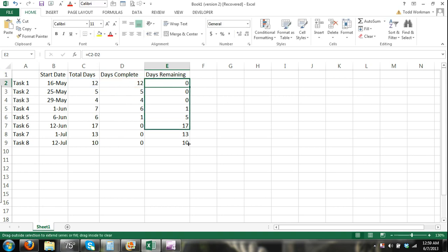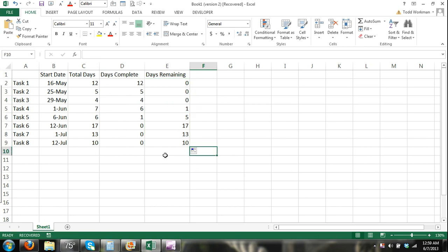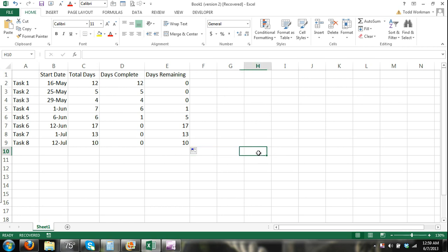I just carry those down and you can see that for this task which takes seven days since we're June 7th, six days have been completed and there's one day left. Now let's go ahead and create our Gantt chart.